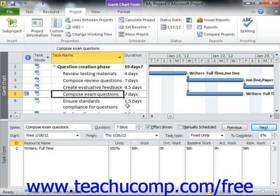Once you have a baseline created, you can then compare the saved values in the baseline against the actual work values that you record. For example, you can see the variance between your baseline task durations and your actual task durations when using the variance view of the table within the Gantt chart view of your project file.